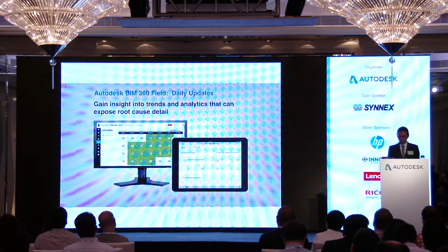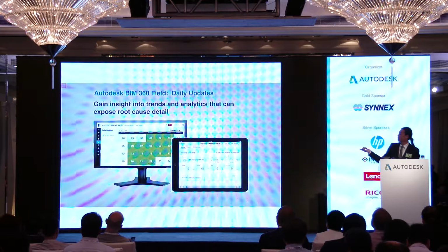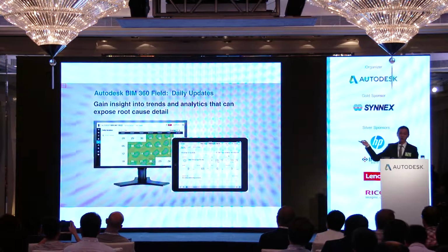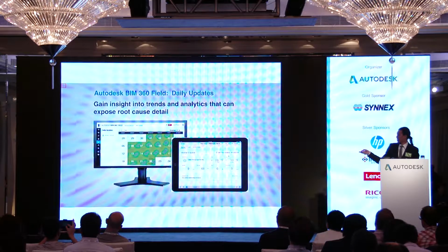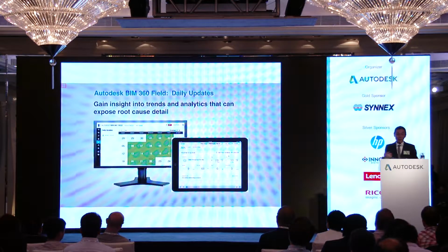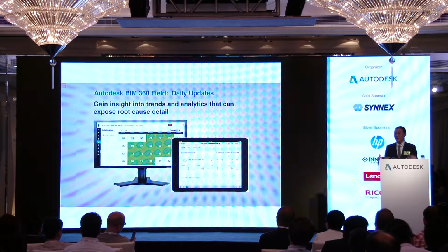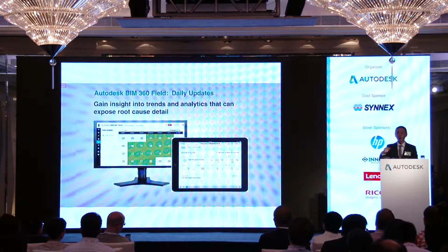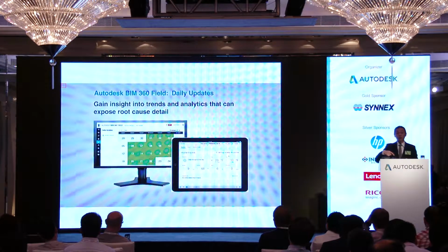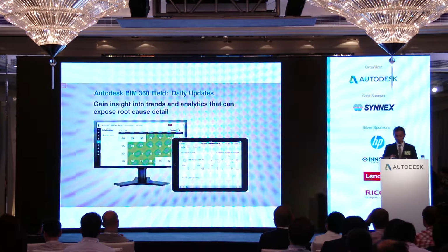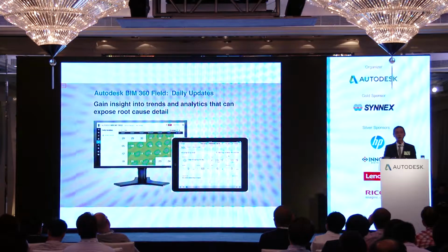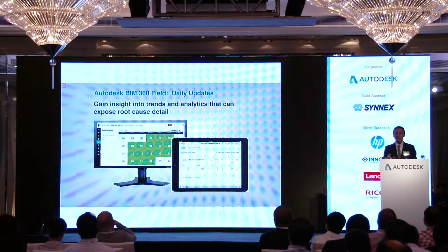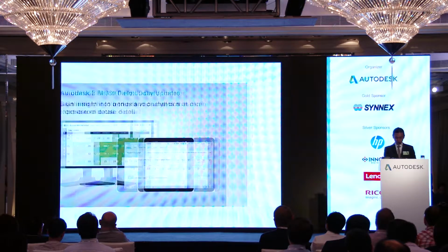And also, like I said, there's the daily record of what's been going on each day, and a weather record, like how many days it has rained within that month. Because they go by the location on the iPad, it's like a shared location, isn't it? So the same data will be the same location. I don't know which weather I get, but it's the same data anyway. If it rains, basically, there's no argument about it.